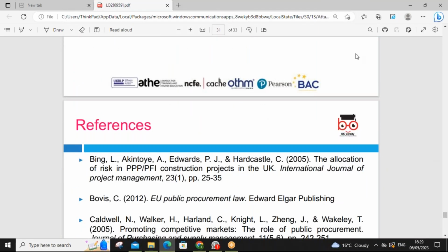So in procurement, we always look at all the terms and conditions within the laws. If the delivery has not been made within the time frame, there can be a penalty. If the quality is not met, what was the LC of it, if it's a foreign procurement and the tender you gave. And we deal with, of course, ministries and embassies. And yes, that's what we need to look at wherever we do this. We always use the term think globally, act locally, and look at the local legislation. That's really what we need to follow.